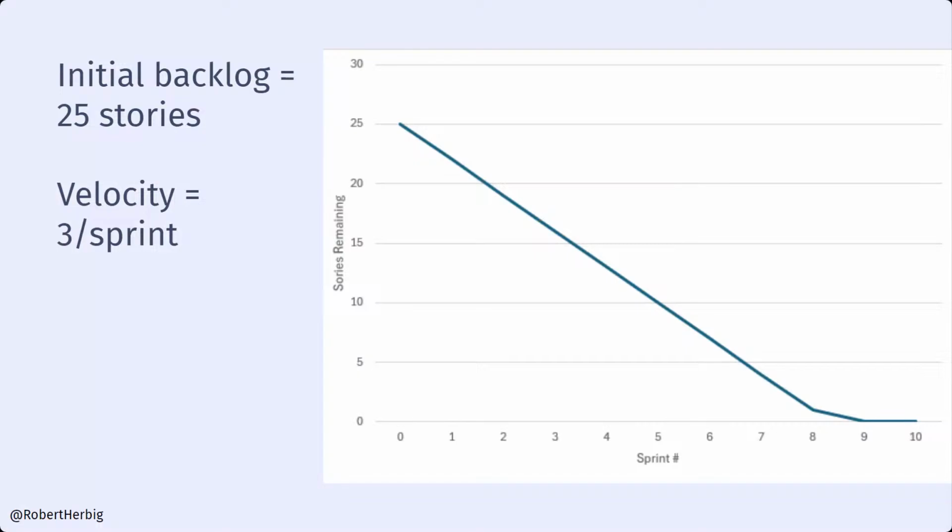And much like the Gantt chart, this is encapsulating only one possible future. While it does tell an interesting story, and it does give us a likelihood that we'll be done in sprint 9, maybe 10, maybe 8, it doesn't convey the certainty, the confidence, and it doesn't convey how likely various possible realities are. And I guarantee that reality will never play out exactly like this, because reality is much gnarlier. Reality looks a little more like this.